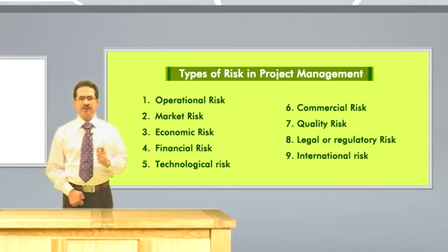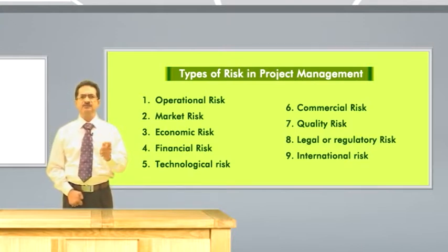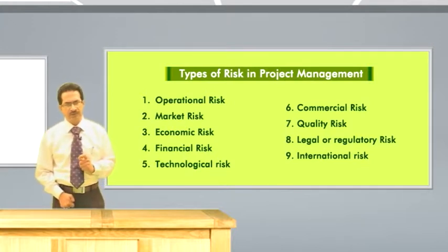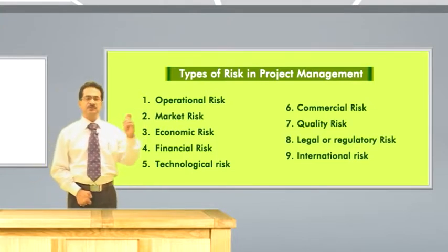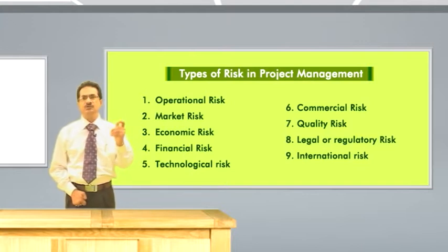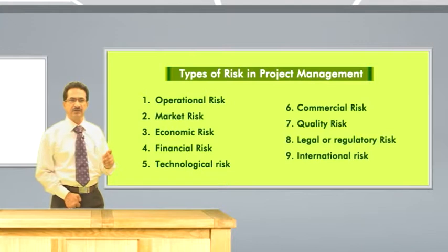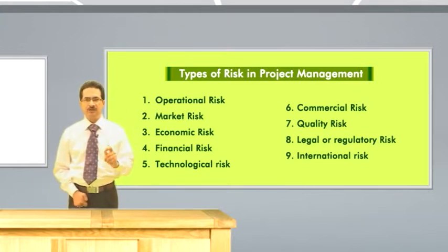The fourth type of risk, most common and applicable to all types of projects, is the financial risks: changes in interest rate and cost of capital. Because if the interest rate is changed, all the financial feasibility criteria or parameters will be changed, including the internal rate of return, return on equity, return on investment, profitability index, etc.